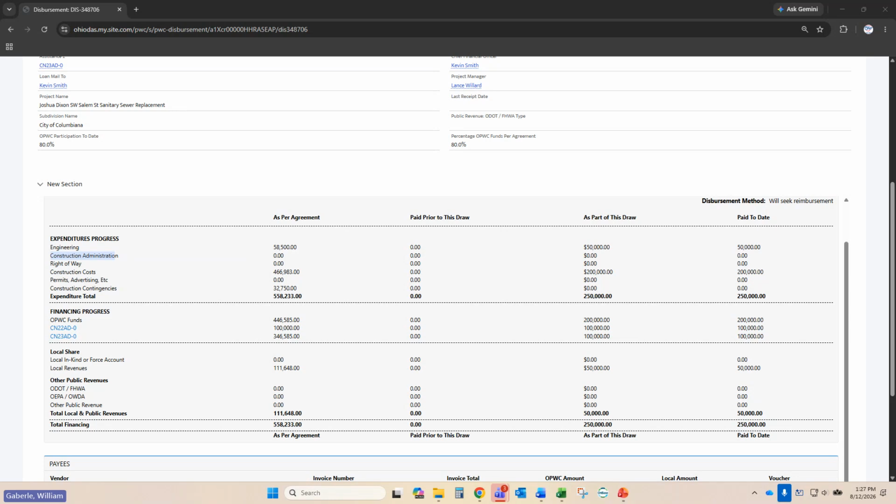So, after picking a vendor, do you need to add address, federal tax ID, etc.? Yes, Rob, you would need to add that information. And that is information that you're going to want to procure ahead of time of doing your disbursement request. You want to actually talk to your vendor and make sure you don't necessarily need the federal tax ID, but what you really want to get is what's called their OAKS ID.